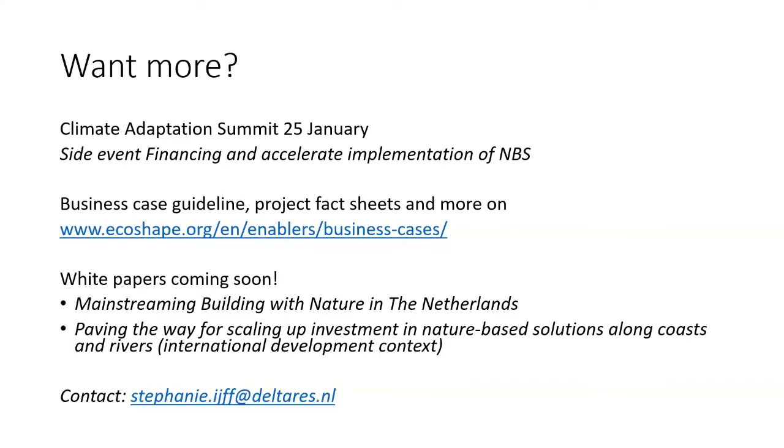Yes, I do think that some of the lessons apply to larger scale projects, but especially the projects of EcoShape that were already more mainstream. Think of the Hondsbosch Dunes, for example, which was a mainstream project. In the end, especially the barriers of institutional embedding are very important to look at when you look at mainstream projects. Because often for pilot projects, special rules are made and more is possible than for mainstream projects. So here I think the barriers and opportunities for the institutional embedding are very important.